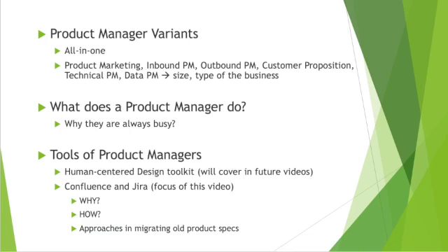During the sprint planning meeting, we look at the user stories that are done, that means they have all the details and already have the effort estimation. Then we make a decision whether they can fit into a sprint. Say, okay, for this sprint, we're going to deliver those user stories.